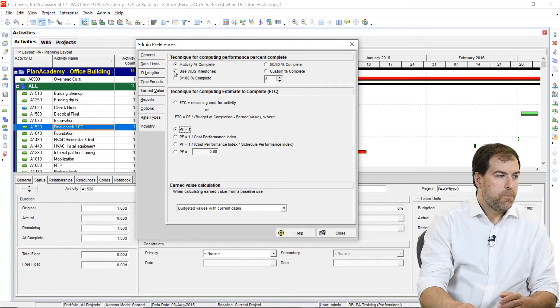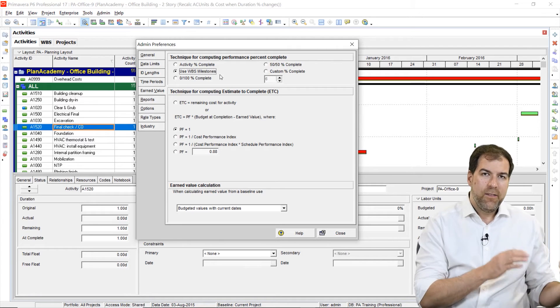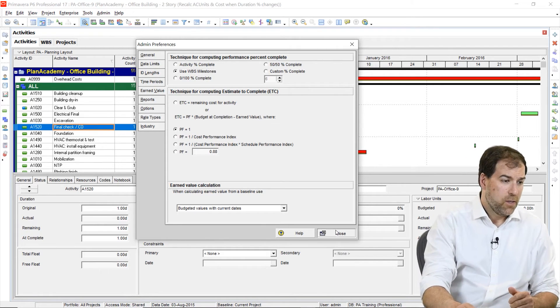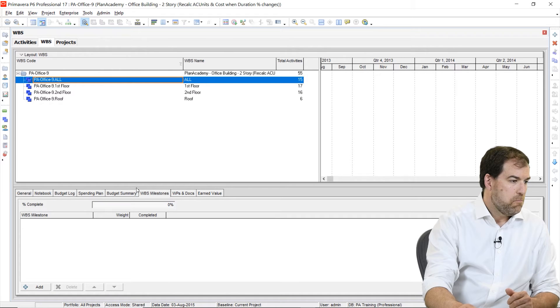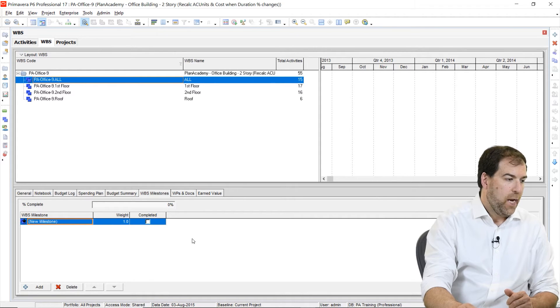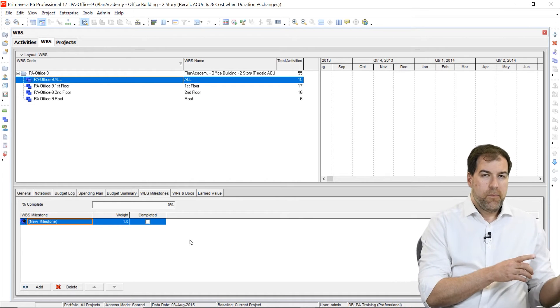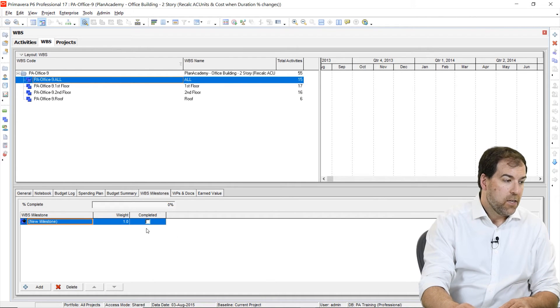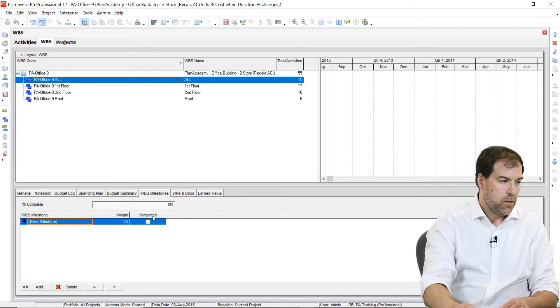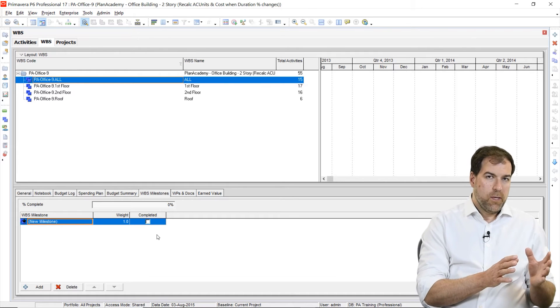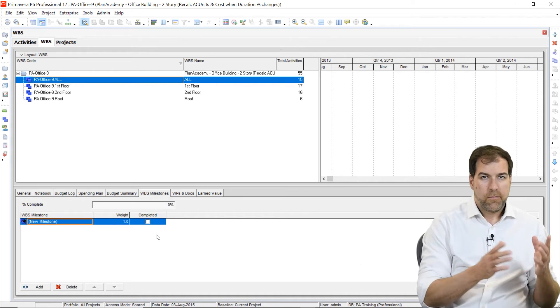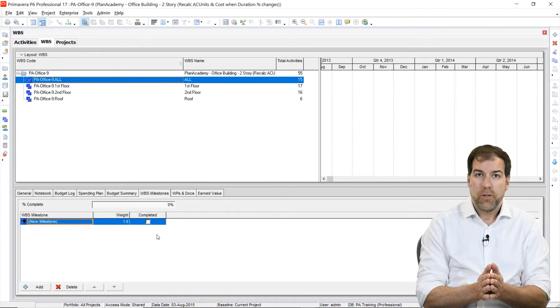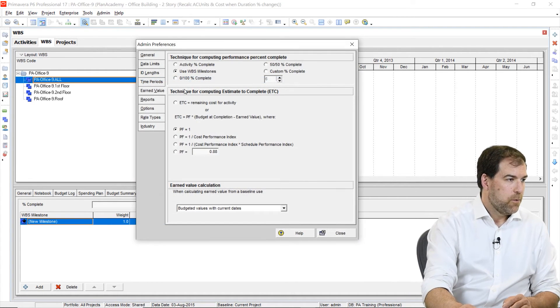Okay, we have another option here that says use WBS milestones. This is very unpopular option, but in the WBS area, and let's go have a look at that right now. Let's go over to WBS. In the WBS area, there is a WBS milestones area. And here we can actually create milestones and weight them. And these milestones can actually drive the percent complete, the performance percent complete of the entire project. Okay, you would actually have to come in here and mark the milestones off, check them using this completed checkbox. In this way, we're uncoupling performance percent complete from any of the stuff that's happening on the activities. And it's all being driven by these milestones. This, as you can imagine, is kind of unpopular. We don't really go this way, but we have options here in Primavera P6. Let's get back to that screen so we can talk about the other options.